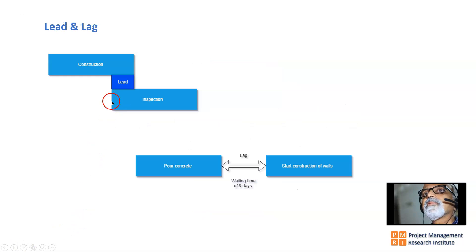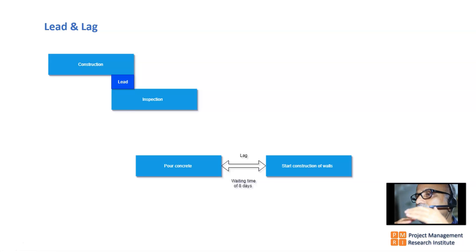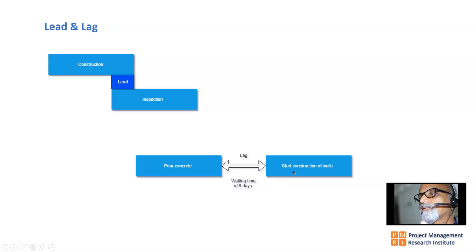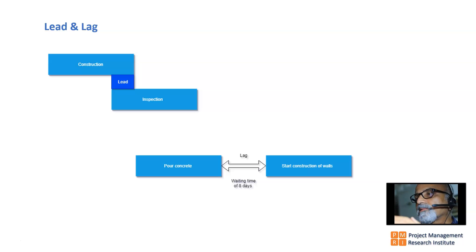Leads and lags: consider Activity Construction and Activity Inspection. When construction is about 80% complete, inspection can start — this is called a lead, which means some amount of parallelism. Similarly, when testing is 30% complete, defect fixing can begin. Lag, on the other hand, is waiting time — for example, after pouring concrete you must wait eight days before starting the next activity. A lag always stretches the schedule, whereas a lead always compresses it.